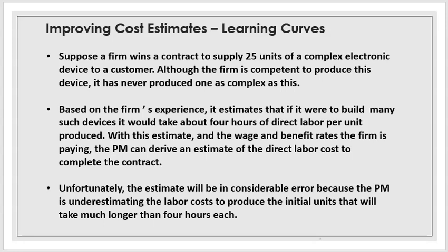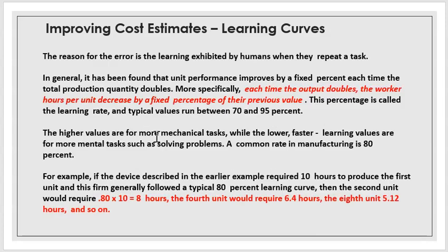So these are examples of learning curves. In general, it has been found that unit performance improves by a fixed percentage each time the total production quantity doubles.